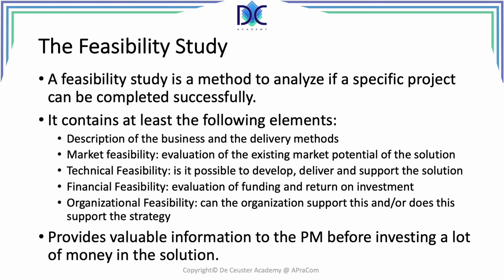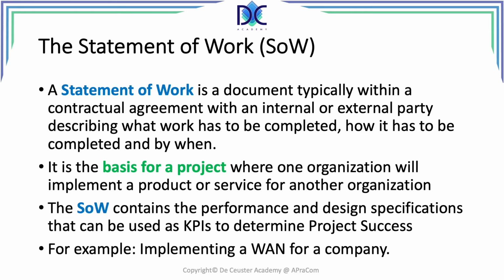investing in the solution. When I was working for AT&T, we offered services to the customers resulting in a contract for implementation and operation of the service. The contract specified the wide area network to be created, and the statement of work resulting from it contained all the different items to be implemented and other services that were part of the contract. The document was referred to as a statement of work and is a document that is typically part of a contractual agreement with an internal or external party.